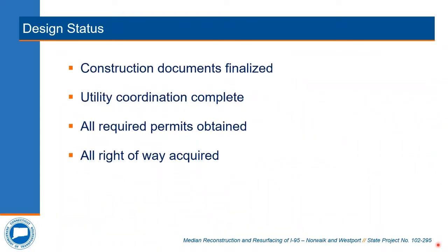To summarize the design status, as of the night of this presentation, June 3rd, 2021, all construction documents have been finalized, all utility coordination is complete, and all required permits and rights-of-way have been acquired. The project is being prepared for advertising.